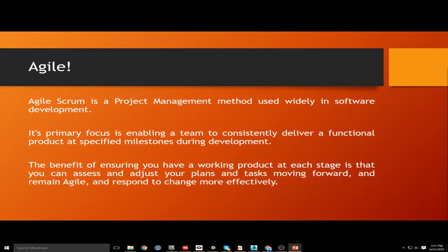So there will be signposts in the road of time along your project where you say, at this point, we will have this thing and this will work like that. And everybody will be happy because you've delivered that. The entire product is not complete, but that feature set, that level of functionality, has been completed. And it's not just about the technical stuff, it's also visual things and audio and general design as well.